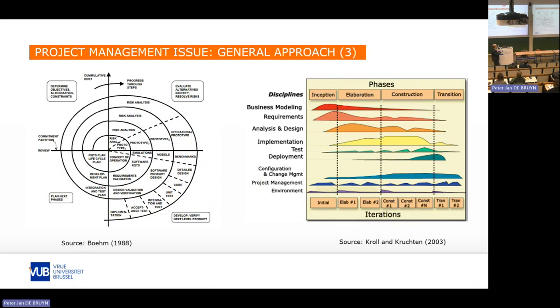You have an inception phase, an elaboration phase, a construction and transition phase, and you see that modeling requirements, for instance, of course, has a peak in the beginning of your project, but it does not just end at a certain point. It keeps on happening a little bit throughout the whole project, but the intensity and the amount of resources that you devote to it decreases over time. And the same is true for implementation. In the beginning, there's almost nothing, but in the later phases of the project, it significantly increases, until at the end it goes down a little bit more.